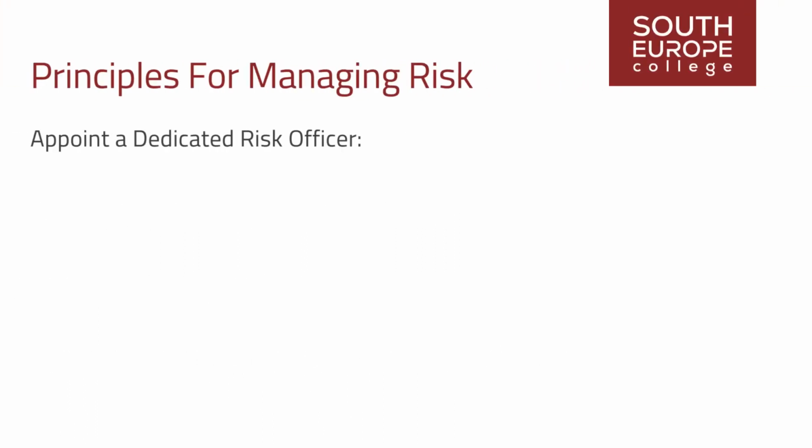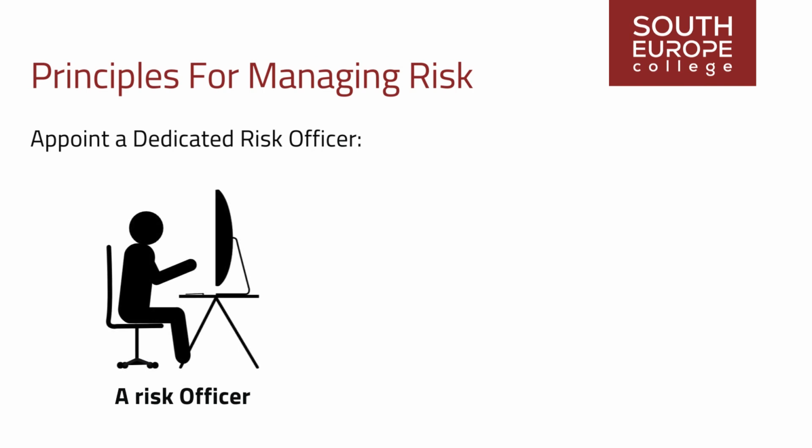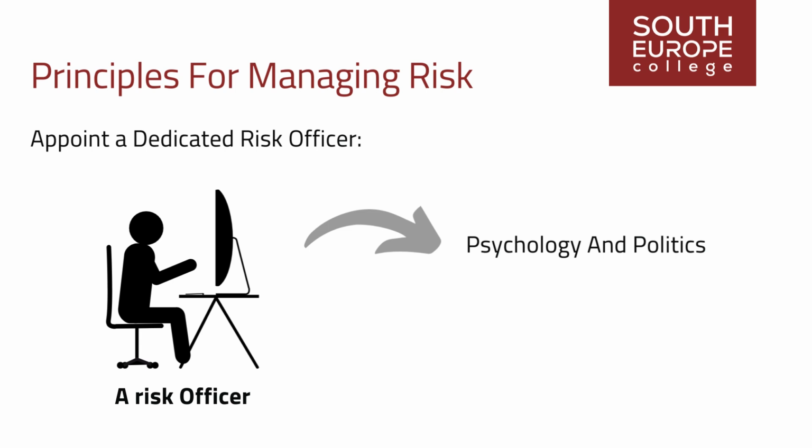Appoint a dedicated risk officer. Designate a risk officer for the project, distinct from the project manager, with a primary focus on risk management. The risk officer's role involves aspects of psychology and politics, necessitating a critical perspective rather than a can-do attitude. The risk officer acts as a devil's advocate, identifying, assessing, and tracking potential challenges even when consensus suggests success.